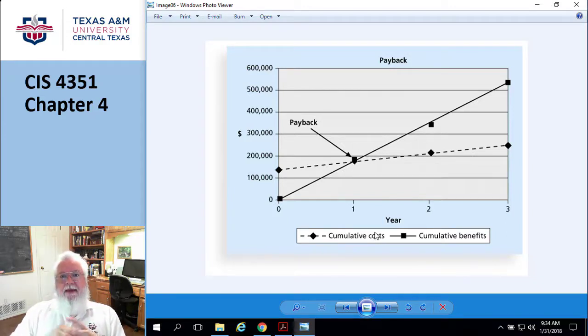Okay, and so I calculated the payback period, how long it would take for me to go in there and pipe natural gas and swap out some of the controls, and the payback period was 4 months. That's the shortest payback period that we had ever had for any project in the history of Fort Hood. A 4-month payback period. It could pay for itself 3 times over in 1 year.